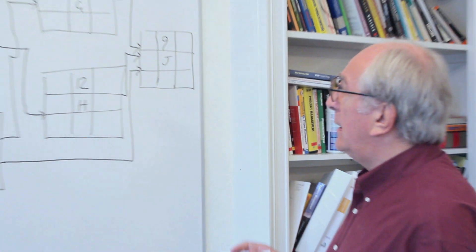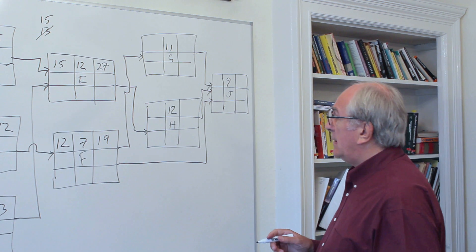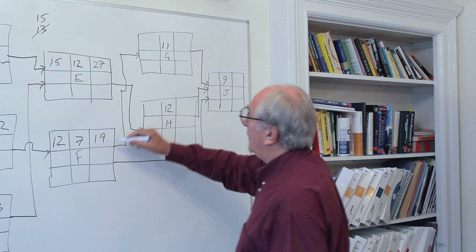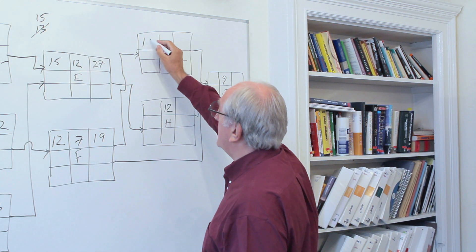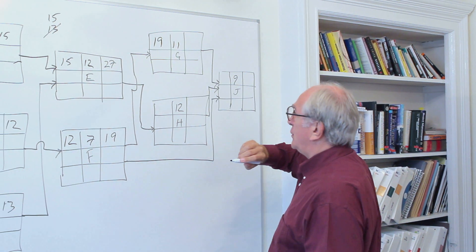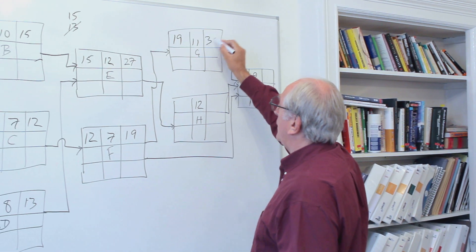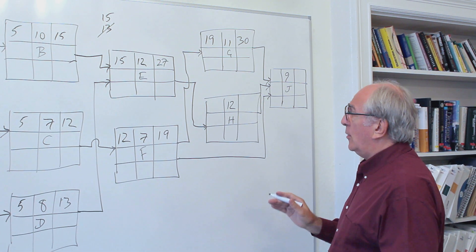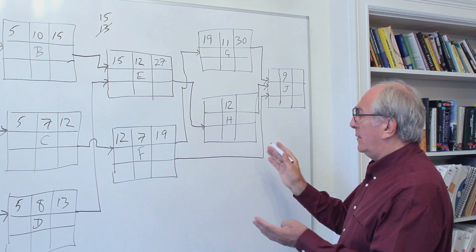We can move on to some other activities here. I suggest that we do the calculation for G, which says now we have to have F done before we can do G. So that gives us the early finish of F, 19, is the early start of G. That gives us an early finish of 30.